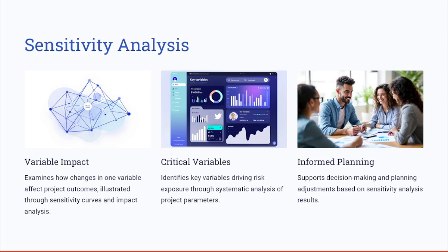For instance, if a project's cost is highly sensitive to material prices, this insight can guide the risk response planning. There are also tools like tornado diagrams, which visually represent these relationships, helping teams to prioritize their effort.